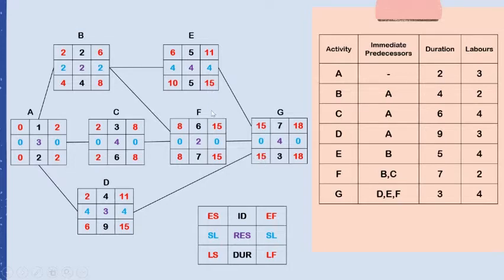The latest finish of activities E, F, and D is fifteen. So fifteen minus five gives a latest start of ten for activity E; the latest start for activity F is eight; and the latest start for activity D is six. The latest finish of activities B and C is both eight. The slack time is calculated as latest finish minus earliest finish. Activities A, C, F, and G have no slack time, so this is the critical path of the project.